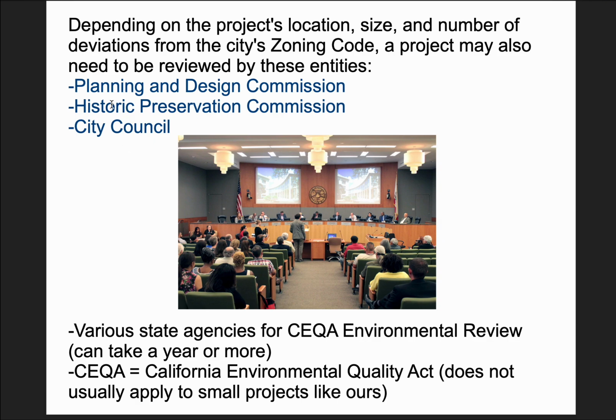You might also have to go through a historic commission, where if you have an area in the city like Oak Park, where there are very old buildings and they want to preserve the historic look of the buildings, you might have to present your design in front of them. If it impacts some business or traffic or something like that, you might have to go through the city council, because your project might impact employment, might impact traffic, and the city council will probably be involved with your application too.